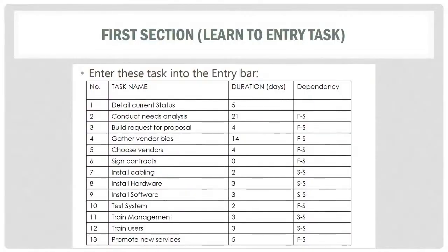in this slide you can take a look at the information inside this dependency. On item number 13 we need to have a FS. So when we have a FS here, it means that it must have the deliverable or the link to the next task. You have to ensure that this part is included.